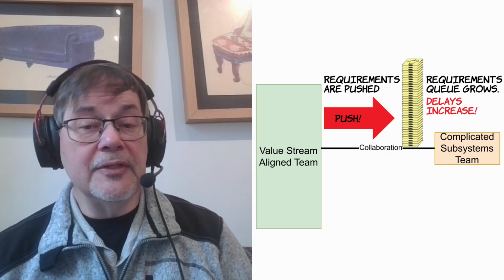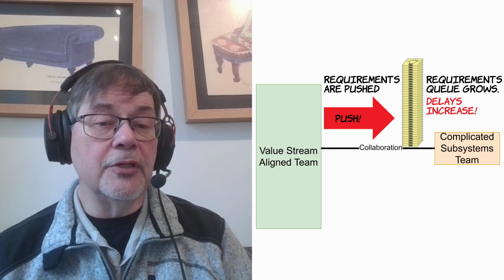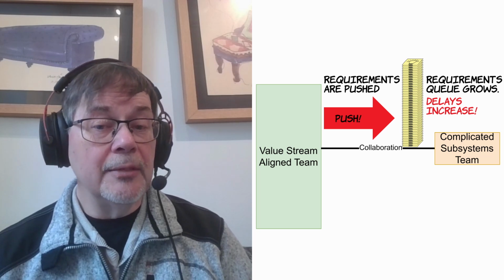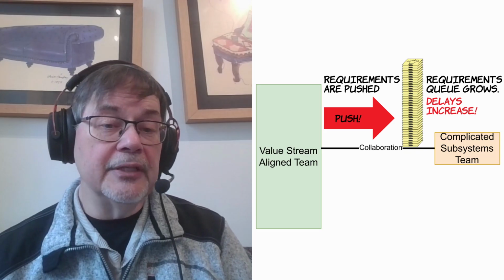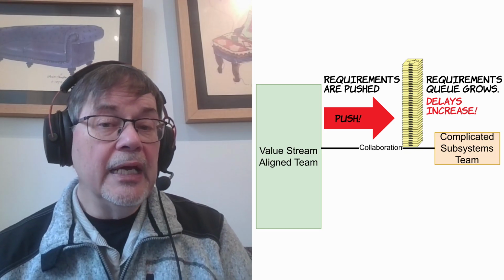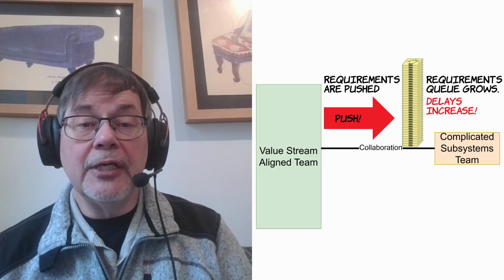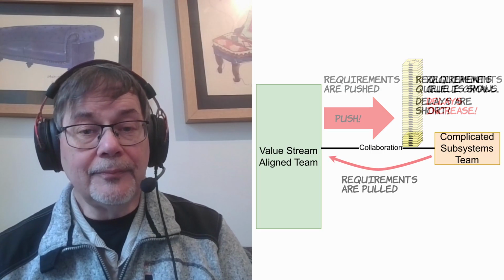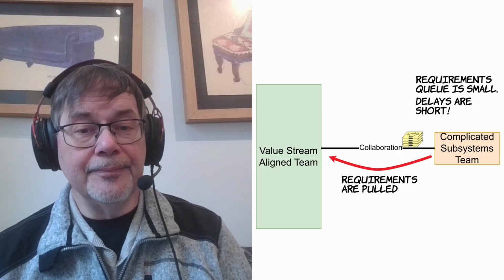Increased queues means increased delays in the process. It also means the developers will get cognitive overload when they try to reduce the queues by working faster, rather than taking control of the process and limiting the queues. In this situation, having a great team topology won't help you. You need to get structure and process to work together.